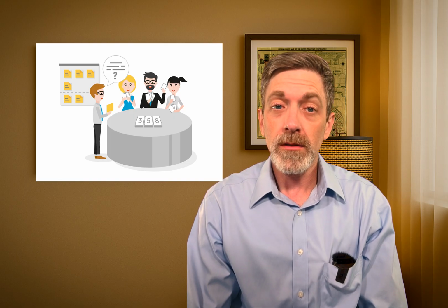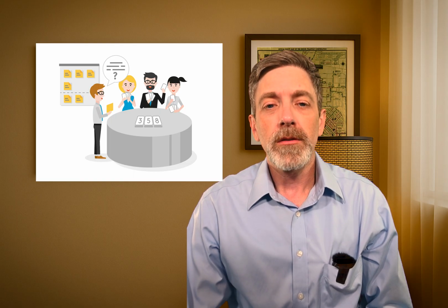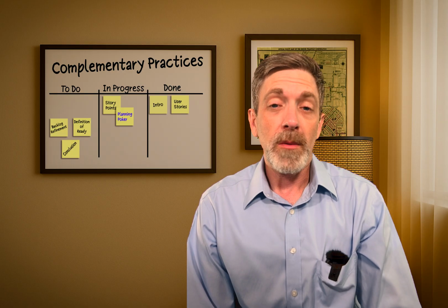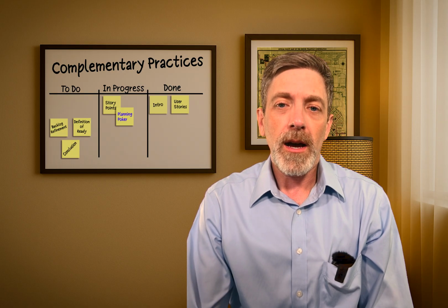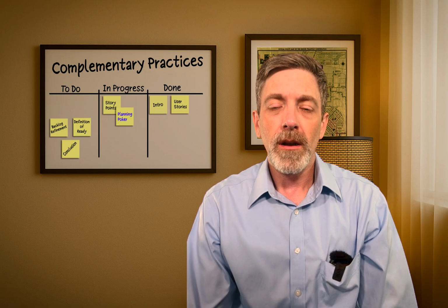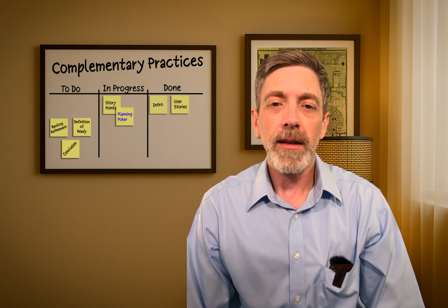Okay, so everybody has their planning poker cards. Either they're holding physical cards in their hands, unlikely, or they're using a plug-in in Jira or Azure DevOps, more likely. Product owner answers questions, maybe a technical lead answers questions. Once everybody has played their cards, the Scrum Master turns those over, revealing everybody's votes. So from here, if the votes are all closely aligned, we make a team agreement beforehand that we're either going to take the highest or lowest value. Teams usually go with the higher value. So if all the votes were 2s and 3s, we would just go with a 3. We don't need to argue over that.